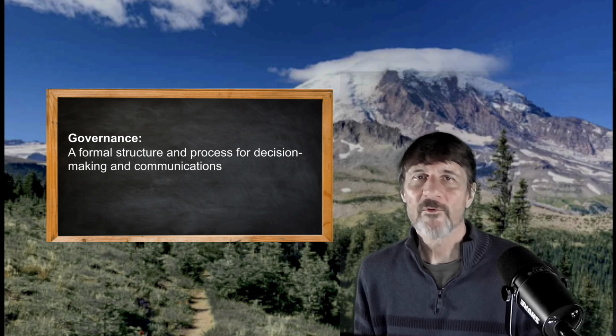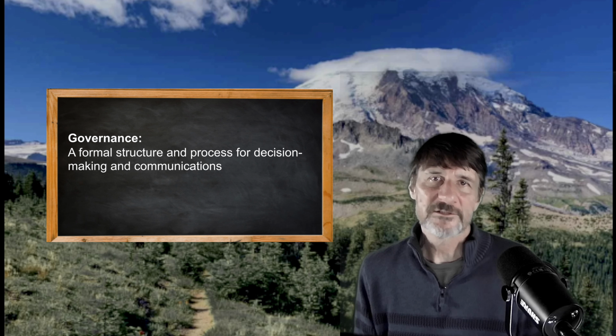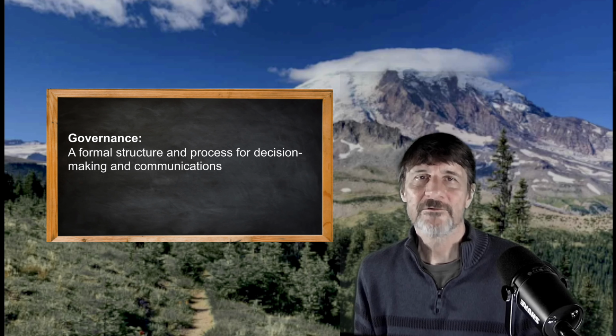And this complete list or definition of done for each should be very unambiguous. So the creation of a process document, for example, should have these are the people that need to approve it in order for it to be done and us to agree that yes, it is complete. Alternatively, if we were to say, yeah, we're done when we create the process, who's to say whether that's actually really done or it's kind of always in flux? This is a great opportunity to bring up governance, a formal process structure for decision making. And again, it's good to have this established upfront, early in the game.